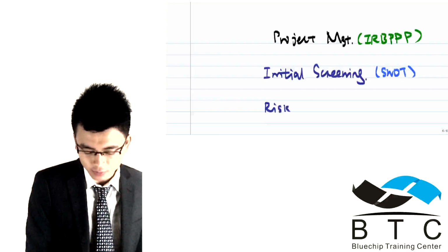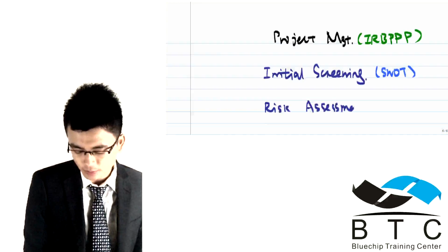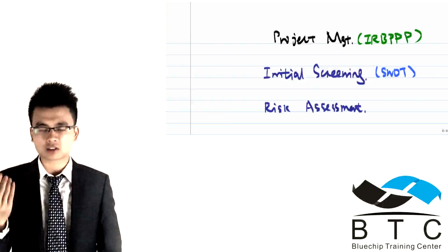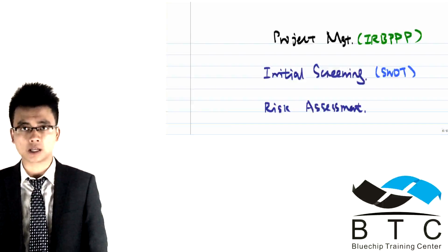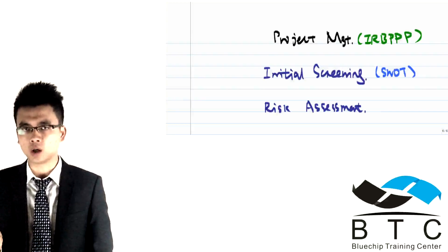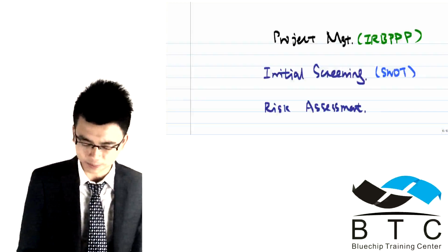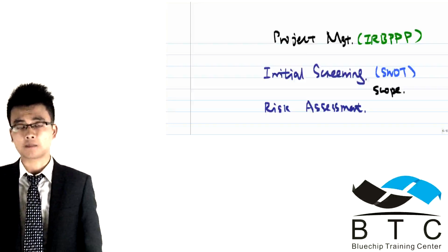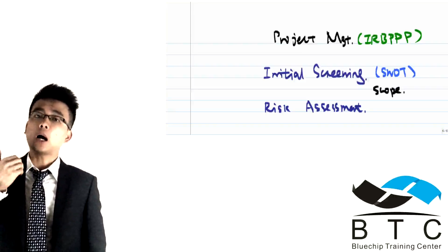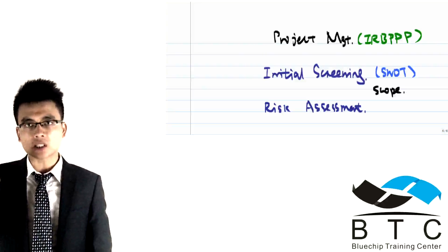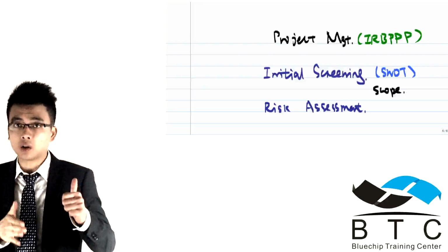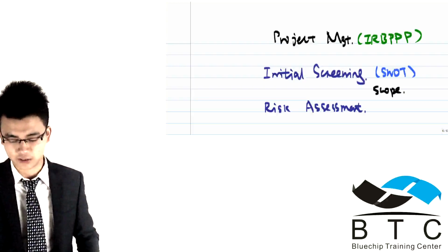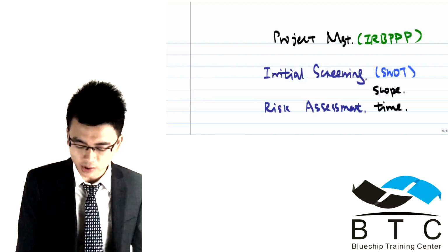Secondly, is where we're going to assess different risks. What we're trying to do here is say, well, the project has the start date, an ending date, the budget, and also the quality, and what could go wrong for those four aspects. So for example, the scope of a project. For example, we are developing a website. Our aim is that the scope of the project will be focusing on the design of the website and also the functionality of the website. So you need to get a clear scope of the project, what you're trying to achieve, firstly. And also the start date and the ending date.